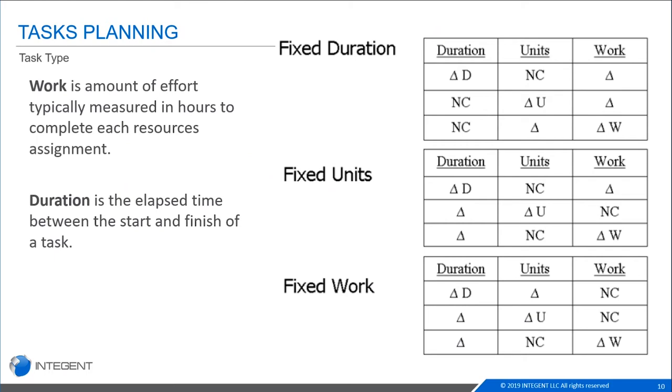If you update your units, your duration is not going to change. It's absolutely fixed. And if you update your work, then again, duration is not going to change and your units are going to have to change accordingly.